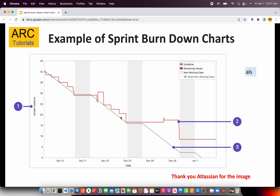Similarly, work was being done on a particular story, and then again around 32 or 33 points were closed. You can see the progression like this — at each step a story was closed. The red color line keeps showing the work that is completed in the sprint. Ideally it should be a diagonal line, but that is a rare case. A straight horizontal line means stories are being worked on, and when stories are completed the line comes down. If the line goes up, that means somebody added a new story or new story points.